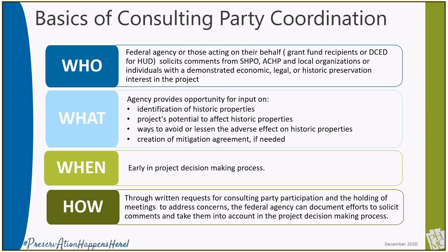The SHPO is always a consulting party with the federal agency for federal projects. Local individuals or organizations with a demonstrated economic, legal, or historic preservation interest in the project may also participate. It is the responsibility of the federal agency to identify and invite possible consulting parties to participate.